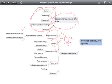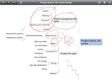Based on the nature or the domain of the project, these life cycles can change. For an IT software development project, the life cycle includes requirements, design, construction, testing, and release. If it is a construction project, it could be requirements, design, excavation, substructure, and superstructure — it goes like that. So the project life cycle is defined based on the nature and domain of the project.